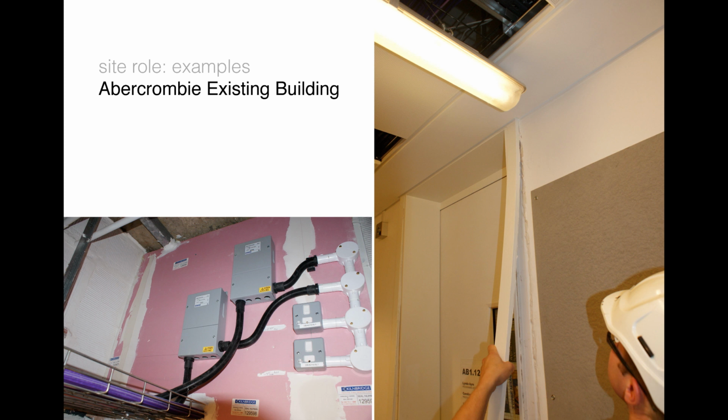And he showed me a trick with a hacksaw blade where you push it down the edge of the door frame and pull it out. And if on the hacksaw blade it's got the fibre, if the fire stopping's in place, it'll pull out the fibres of the fire bat and the intumescent sealant in the teeth of the blade. And we did that on a few doors and there wasn't any, no evidence of any fire stopping.